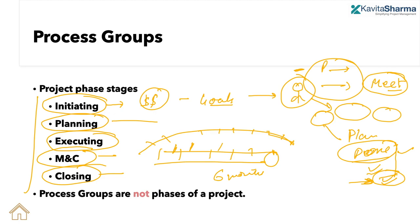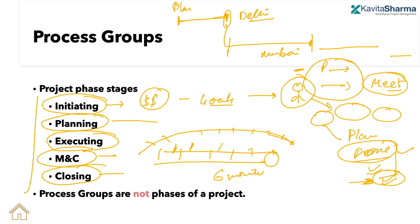Understand that process groups are not phases of the project. For example, if I want to roll out 5G to various parts of India, I may do a trial phase in Delhi first, then Mumbai, and so on — those are phases. Each phase is planned, executed, monitored and controlled, and closed. So initiating is not a phase; within a phase you could have initiating, planning, executing, and monitoring and controlling all happening.